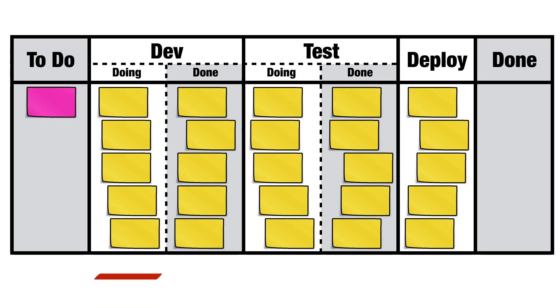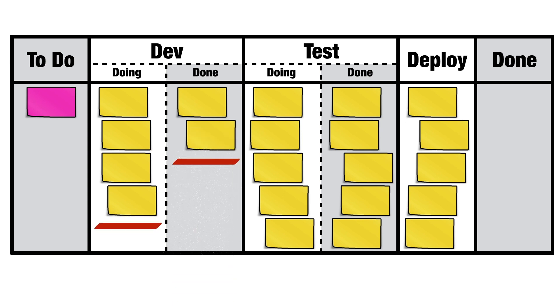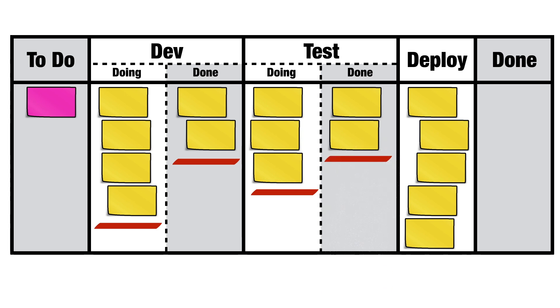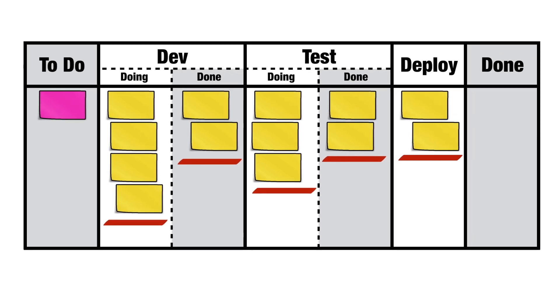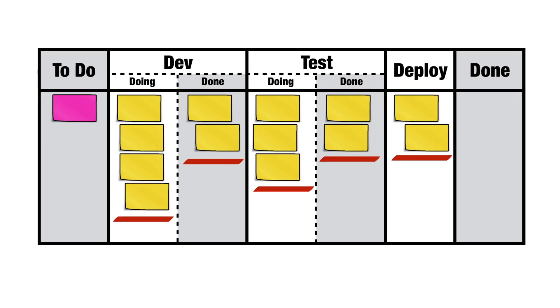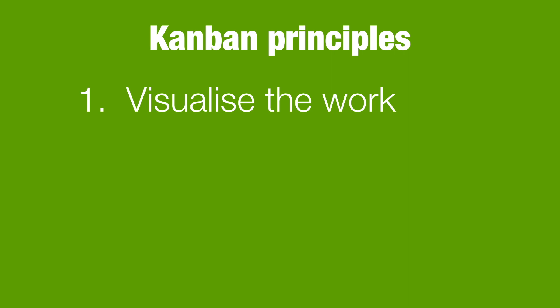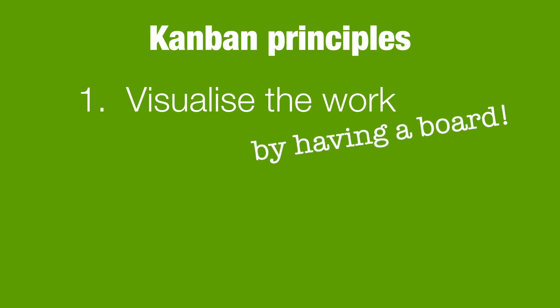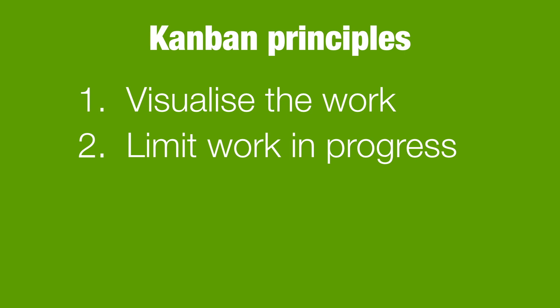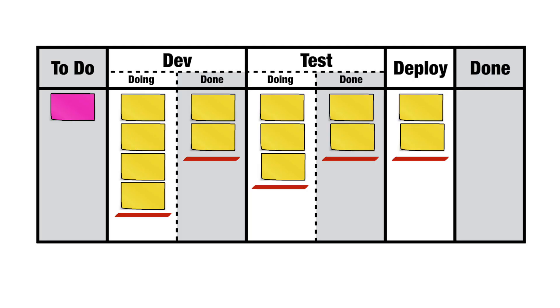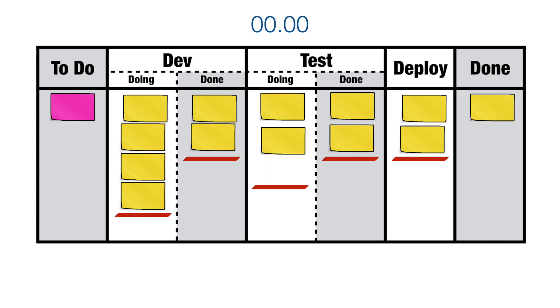I'm going to add a WIP limit of four for dev doing, two for dev done, three for test doing, two for test done, and two for deploy. We've already come across two Kanban principles. They are: number one, visualize the work; number two, impose WIP limits. Let's see this team in action, and keep an eye out for Mr. Pink. Things are rather gridlocked, so he's going to have to wait a few seconds for some space to appear.